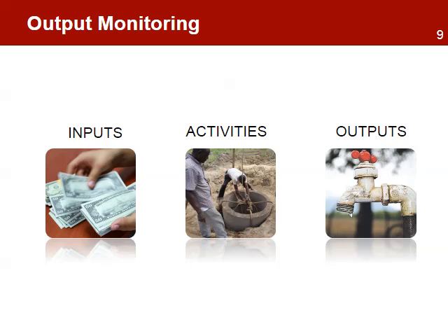Output monitoring looks at the input, activity, and output process and monitors their performance against implementation plans. Monitoring inputs includes the use of the resources assigned to the project and how the project is using these resources on the planned activities. For example, monitor the rate at which the budget is used. Will the project have enough money to complete all activities? Monitoring activities includes the completion of all the activities and the progress in the schedule to complete all planned work. For example, are there any delays in the schedule that can increase the cost of the project?